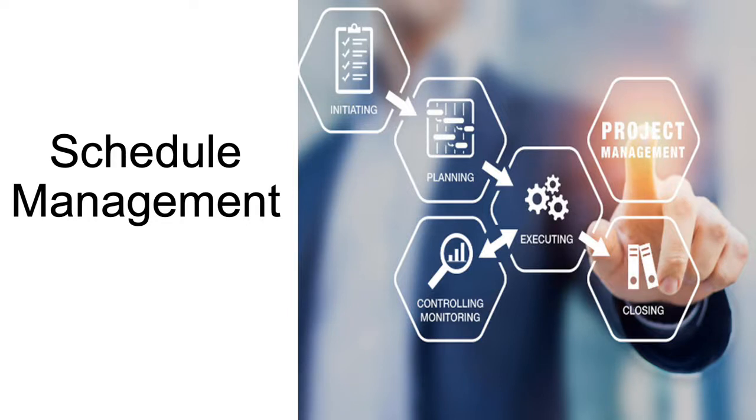The next one is schedule management. One of the most important tasks of a project manager is to make sure that the required deadline can be met, along with organizing options to make it happen. And these aspects should be planned and approved ahead of time, prior to the project execution process. As for schedule management, please keep in mind, the project manager is responsible for creating a realistic schedule, and he or she always remembers some compression options that help to meet this project plan deadline. And these options are fast tracking and crashing. We will discuss them a little bit later in this course.